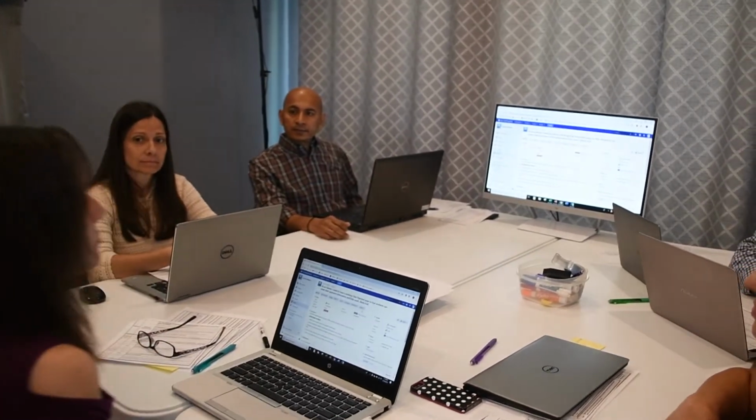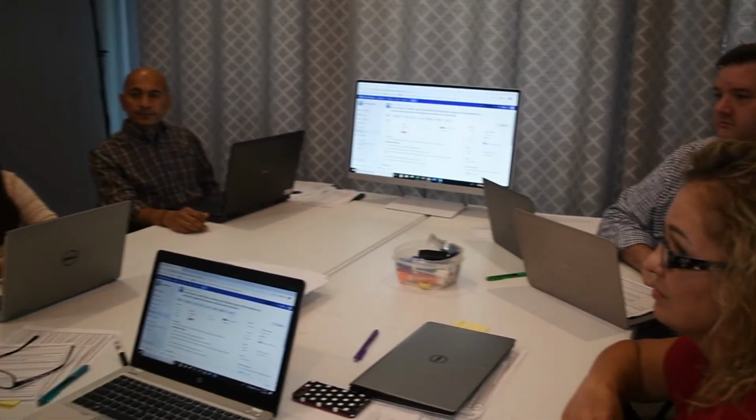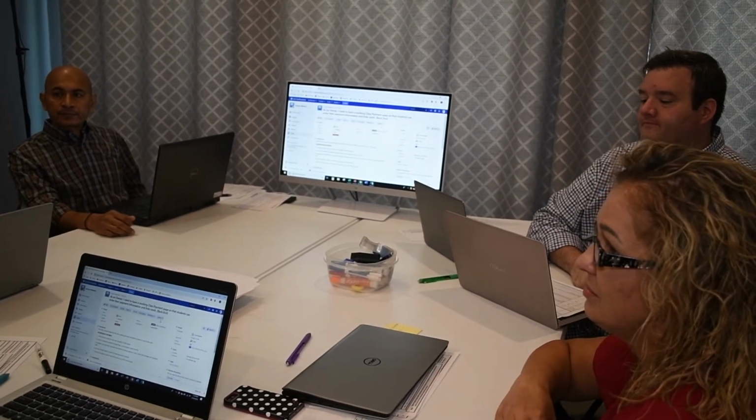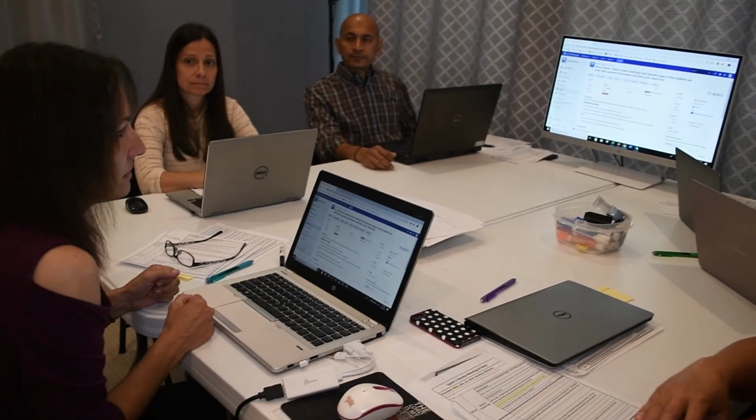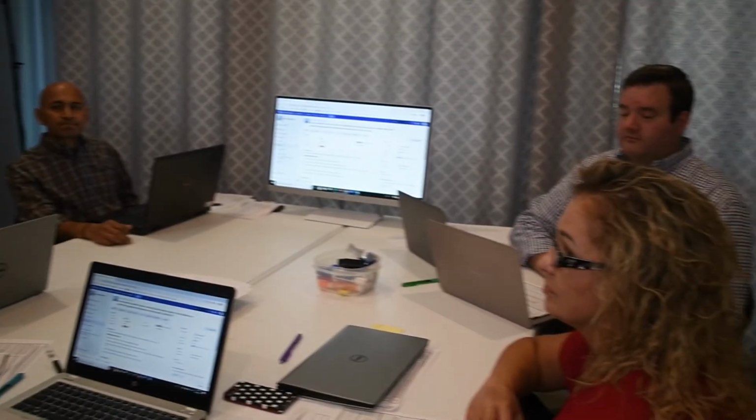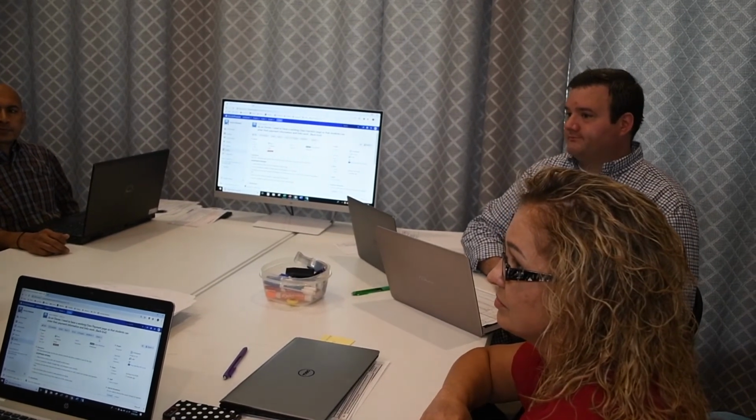Okay, so why don't you guys start? I'll get the story created and put 13 points on it. If you get into the story and it gets really hard and we need to do a spike, we can add a research story to it. So I'm going to put the points on here, and while you're working on all this other stuff, you guys can look into the PayPal stuff. Sounds good. And then we can talk about it at our next refinement meeting.